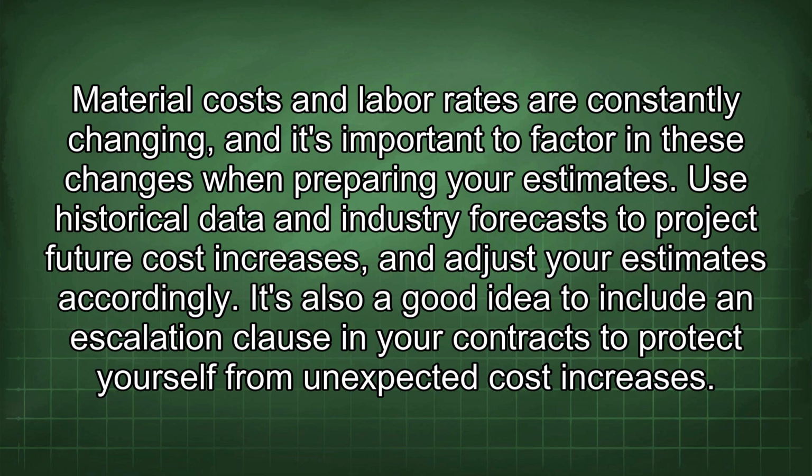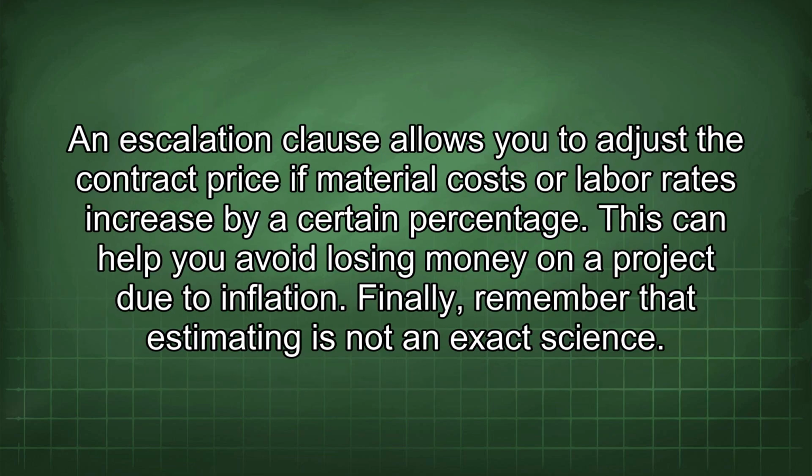It's also a good idea to include an escalation clause in your contracts to protect yourself from unexpected cost increases. An escalation clause allows you to adjust the contract price if material costs or labor rates increase by a certain percentage. This can help you avoid losing money on a project due to inflation.